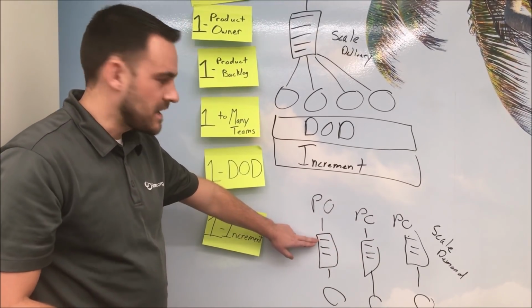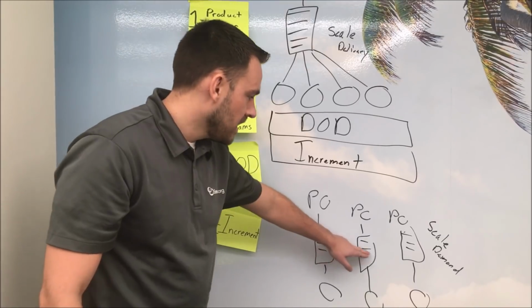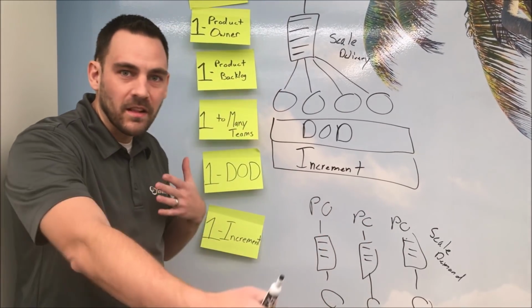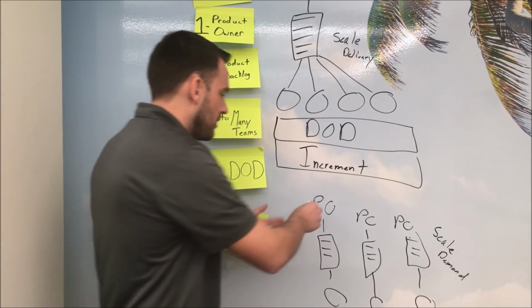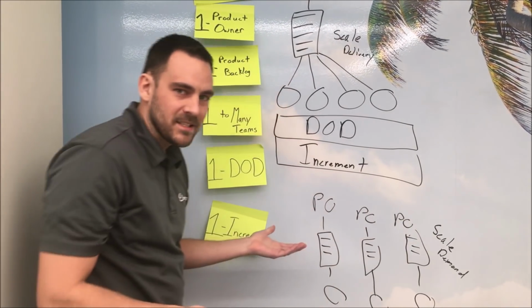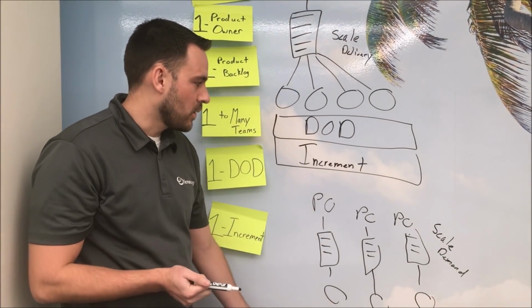What often happens is the same piece of work to actually deliver something to our customers is here, here, and up here in this backlog. And so to actually deliver it takes a long period of time. Also, there's no one to really make a concise decision, so decision making is very slow in this area. So we can't respond to change very quickly.